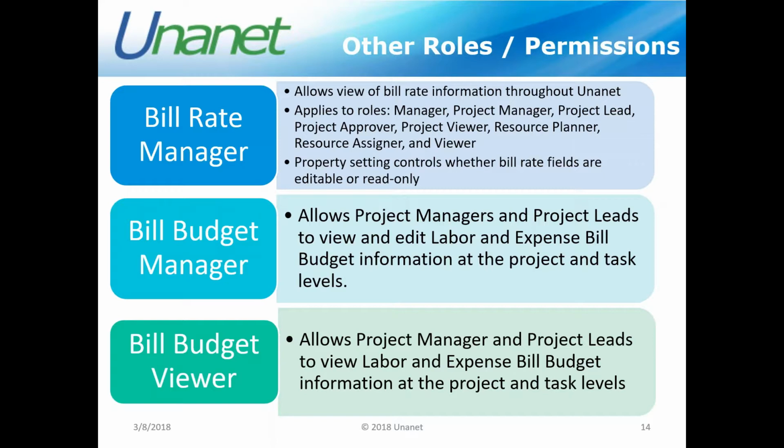The one that I think is the biggest one that people use is the bill rate manager role. And this allows the view of bill rate information throughout Unanet. And it applies to the manager, project lead, project approver, project viewer, resource planner, resource assigner, and viewer roles. Now, what that means is, let's say you did not have the bill rate manager role and you're a project manager.